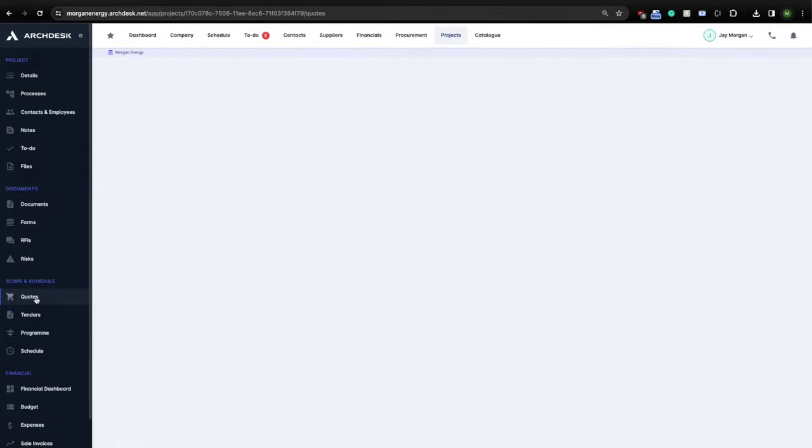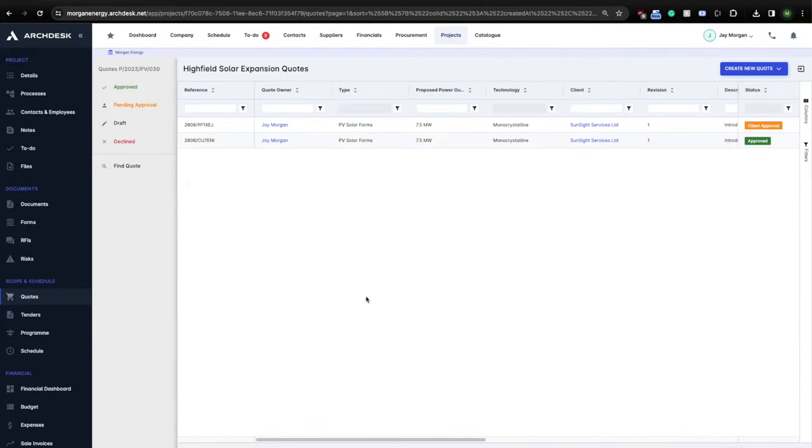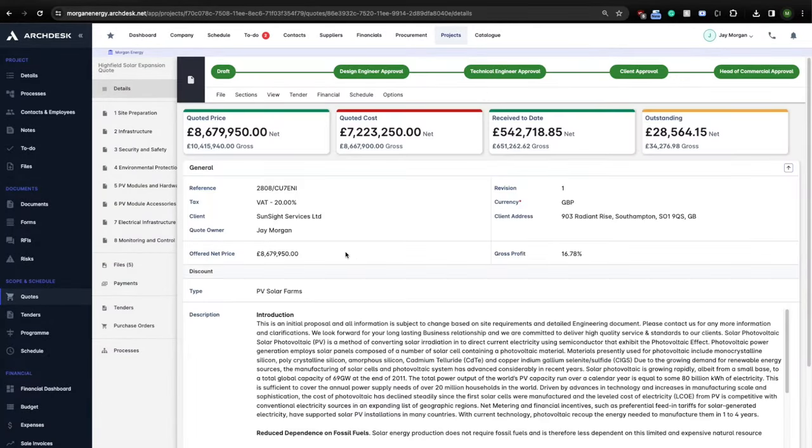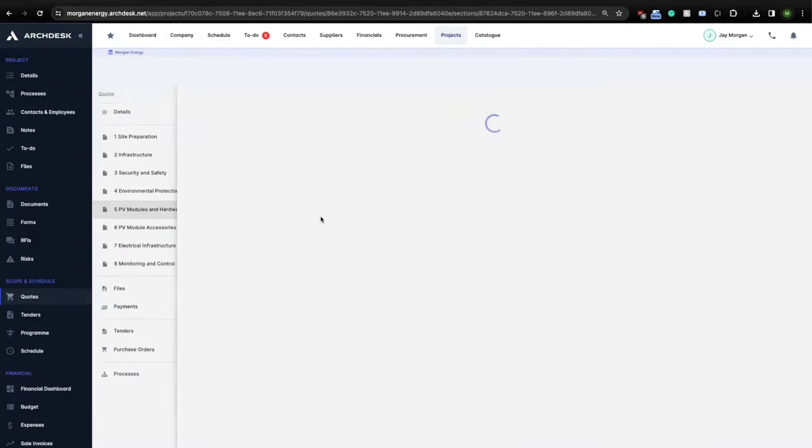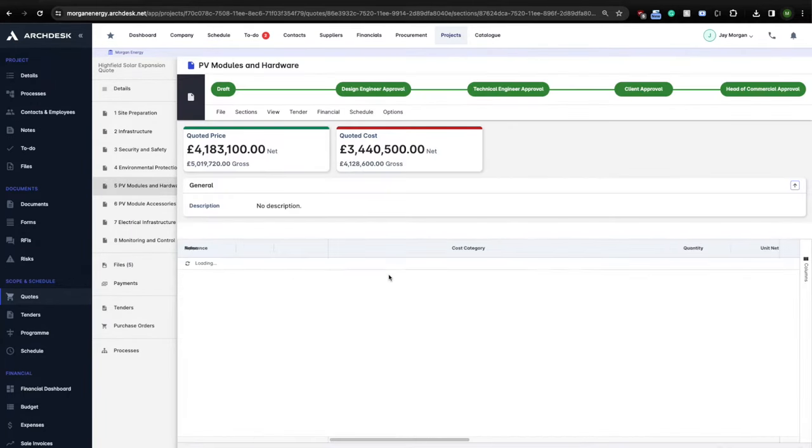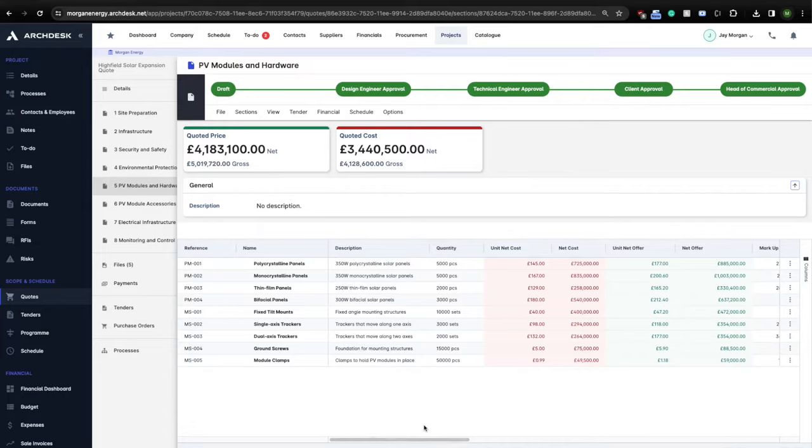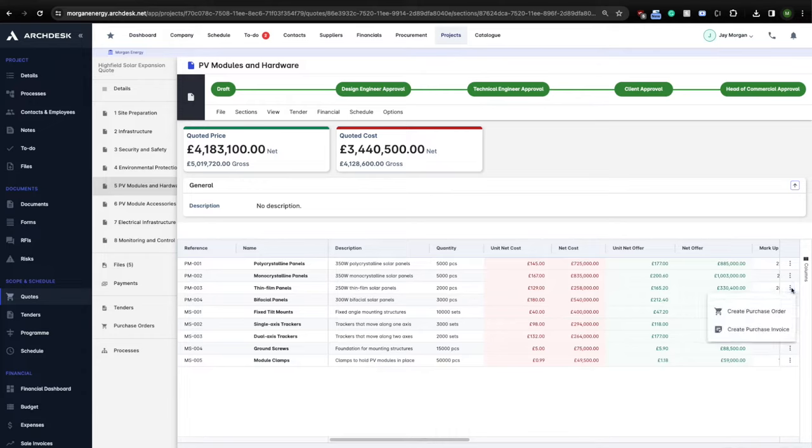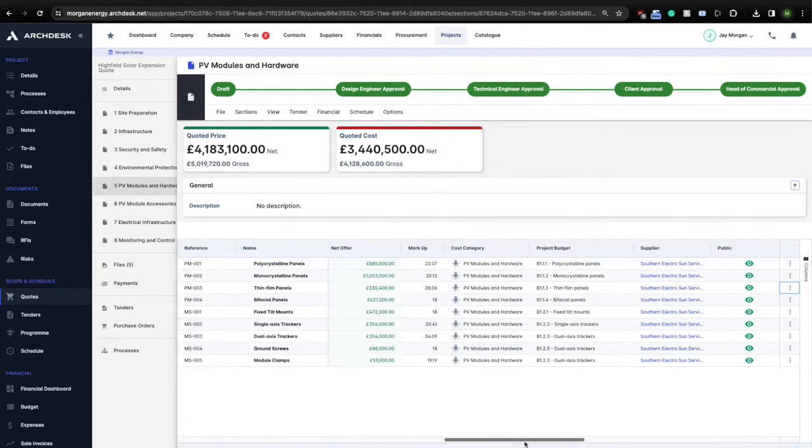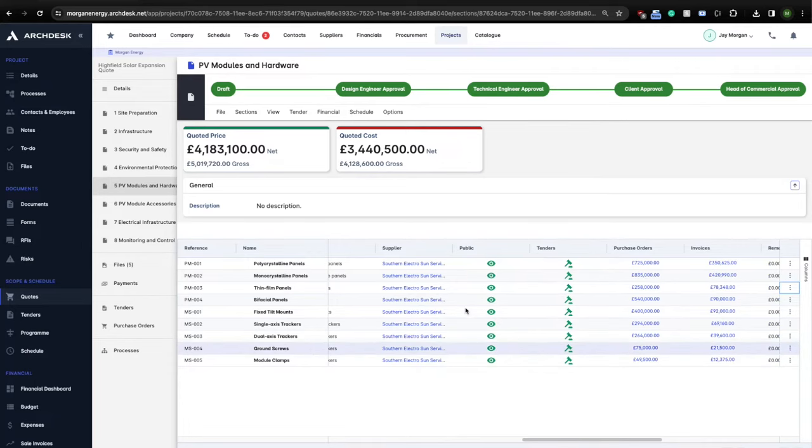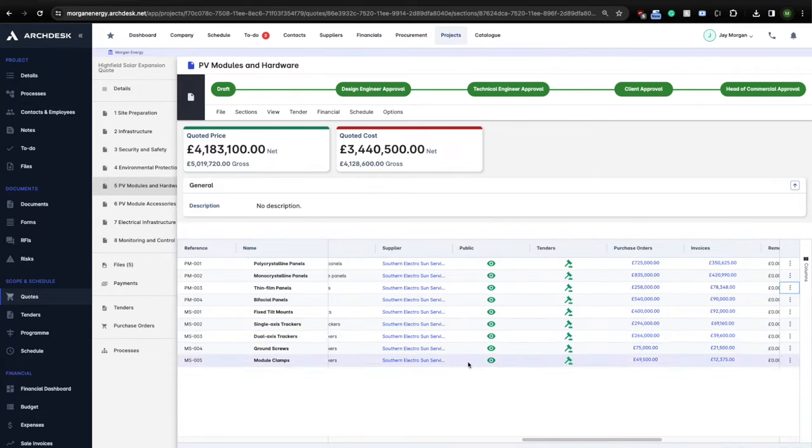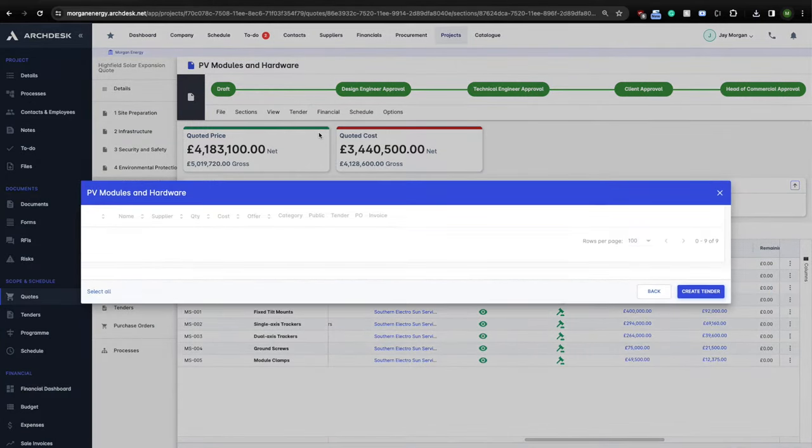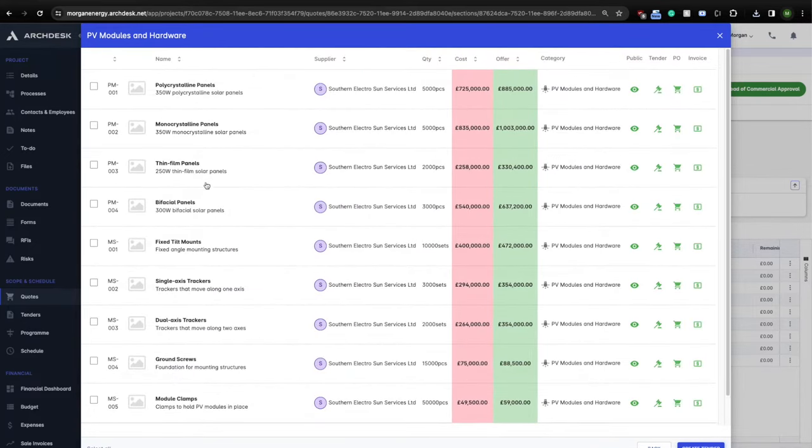ArcDesk has one of the most powerful procurement modules dedicated to construction and capex-intensive industries like the energy sector right here. Let's have a quick look. Let's imagine we are a procurement specialist, tasked with buying the relevant materials based of this quote for this project. Now we could simply create a purchase order directly with just one click for any of those items. But let's make it a little bit more complex for us, and let's assume we don't know who the best supplier for these works is. So we should probably issue a tender and determine the best bidder. Let's create a quick tender for this section. It's as easy as just clicking Create a tender and selecting relevant items.